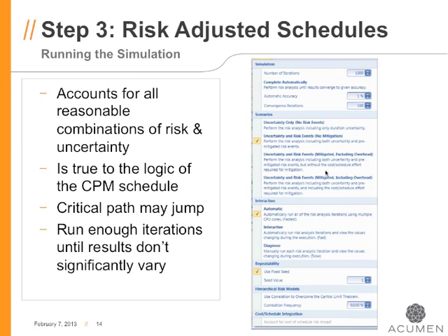So we just touched on the fact that in our risk register, we have current state and we have mitigated state. So here you can see an example whereby we can very quickly run a scenario where maybe we just want to look at the impact of uncertainty, or we want to look at the risk exposure taking into account risk events without the benefit of mitigation.